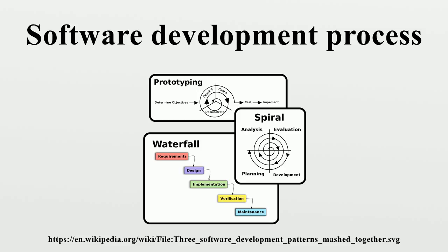Waterfall development. The waterfall model is a sequential development approach, in which development is seen as flowing steadily downwards through several phases, typically: requirements analysis resulting in a software requirements specification, software design, implementation, testing, integration if there are multiple subsystems, deployment, and maintenance.